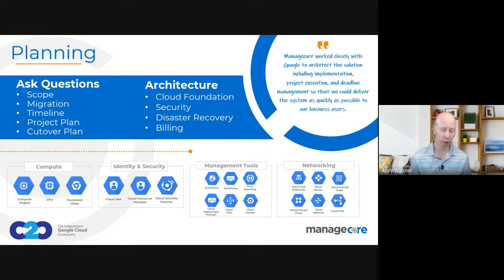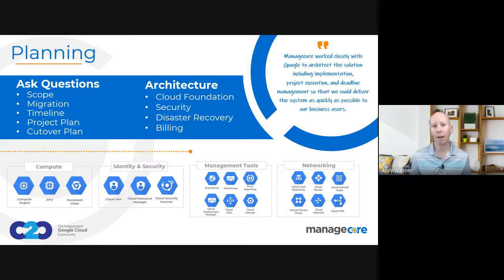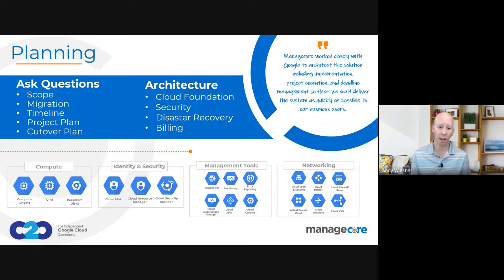You've got a little more leeway in a development or QA environment where you can have some additional downtime. But once we're in production, there's typically only so long that you have to accomplish your downtime and the scope of the work. All of that needs to be put into your project plan and cutover plan.